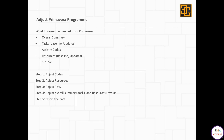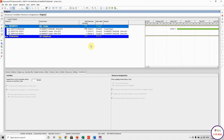So what information is needed from Primavera? I take the overall summary, the task tables from either the baseline or the update, the activity codes, the resources from either the baseline or the update, and the S-curve. There are five steps to finalize this database: first adjust the codes, then adjust the resources, then adjust the PMS (progress measurement system), and finally export all the data to Excel.